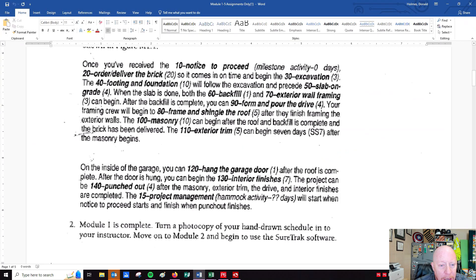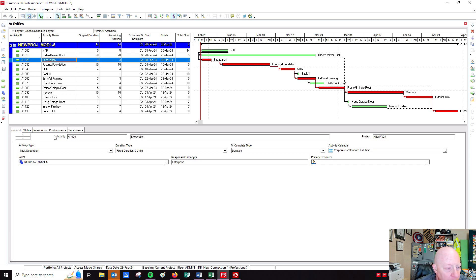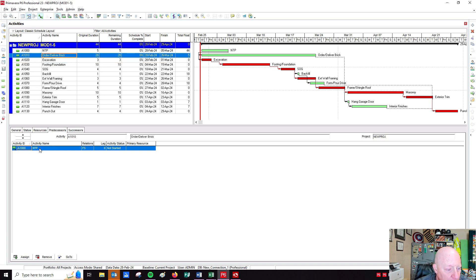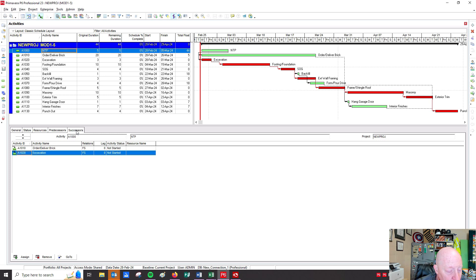If we go back to the text, it says after notice to proceed we can order and deliver brick and start excavation. Before I turn this into a milestone, I'm going to build that relationship. I'll click on order and deliver brick and pull down to notice to proceed and excavation. If I click on excavation and look at predecessors, the predecessor is notice to proceed. If I click on order and deliver brick, the predecessor is also notice to proceed. If I click on notice to proceed, I have no predecessors because nothing comes before it. But under successors, I've got two activities — both finish to start with no lag.